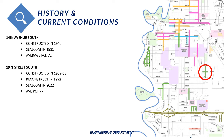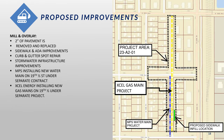Within the project area, there are sections of curb and gutter that we will be replacing or correcting to improve drainage. The utilities — including the storm sewer and sanitary sewer — are in good condition and we're not proposing significant work to those. The water main on 19th and a half Street is old cast iron and will be replaced by Moorhead Public Service under a separate project. The proposed street improvements will be a mill and overlay, including removing and replacing a couple inches of pavement. Moorhead Public Service will replace the water main on 19th and a half Street, shown as the blue dotted line, under a separate contract in advance of our street improvements project. Xcel Energy will also be replacing their gas mains on 19th and a half Street South under a separate contract, completed ahead of the city's project.